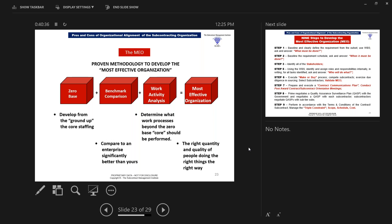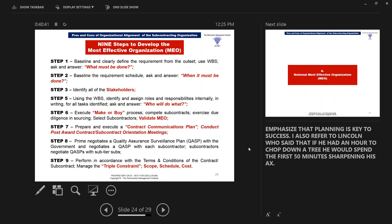Let's look at the nine steps to develop the most effective organization. I find it interesting that organizations dealing with the federal government are not project management centric, and that creates a lot of our problems. Number one, you have to baseline and clearly define the requirements from the outset — the best tool for that is a work breakdown structure, asking and answering the question: what must be done? Once you determine what must be done, you must determine when it must be done. The third step is to identify all the stakeholders — anyone who has or is impacted by the outcomes of whatever you're doing. You have many external stakeholders, particularly in a government contracting environment.